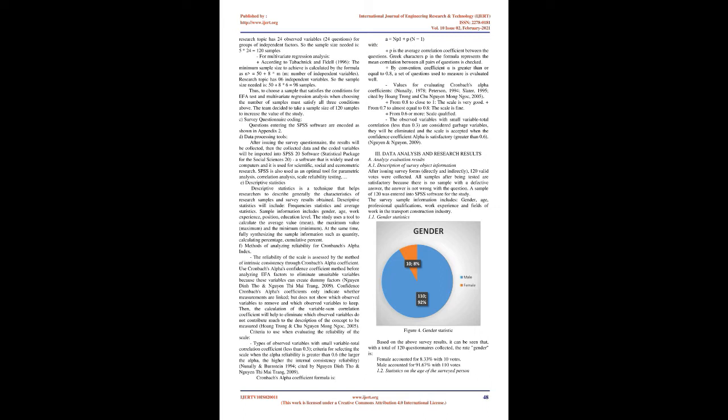R4: Group of risk factors involved in the design process, including changing design drawings, time for designing and estimating, and time for design and estimate verifying. These factors cause the risk of delayed progress and unsatisfactory design quality, requiring additional adjustments which makes construction costs increase.